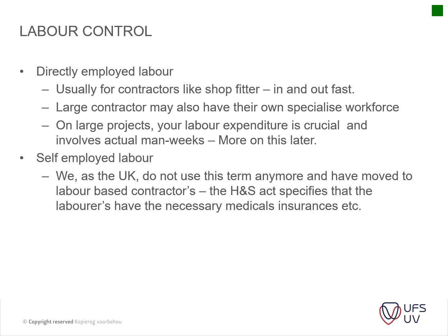Guys that specialize in labor, which have the necessary insurance, they have their medicals updated, UIF and all those items they look at, because you can imagine if you've got one or two projects and you suddenly have 100 people that you need to appoint, and then what do you do with them once the project is done? So that's where the labor only comes in.